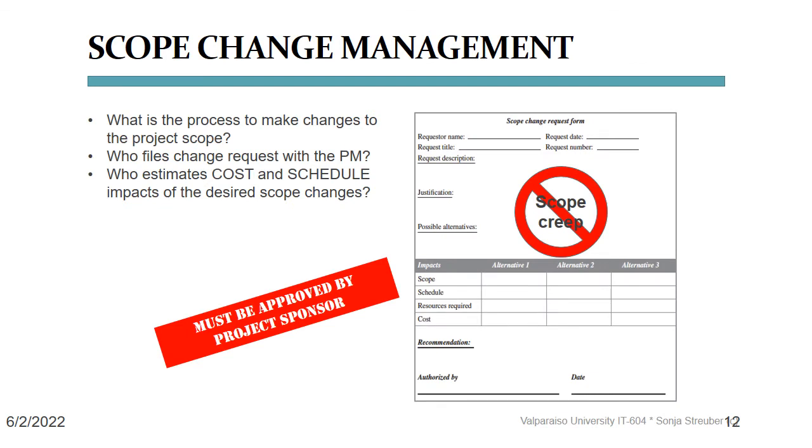In a waterfall project lifecycle in which we nail down the product and project scope in a large set of requirements, even before we have begun designing our solution, that is where we need to keep changes to our project scope tightly under control. We do this by making changes to what we are building only by completing a change request form for each desired change to the requirements. That includes addition to or deletion from the requirements catalog, modification of requirements, and so on.